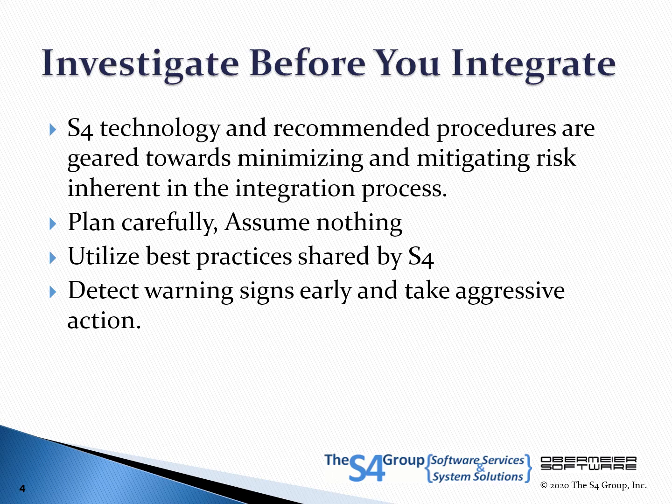If devices are not working properly before the integration is applied, the situation will only become worse because of the volume of transactions that can be generated by the BACnet ecosystem. Allocate time to reprogram, recommission, repair, or replace N2 devices as required before doing the integration. Failing to take these steps significantly raises the risks and therefore costs of an integration.